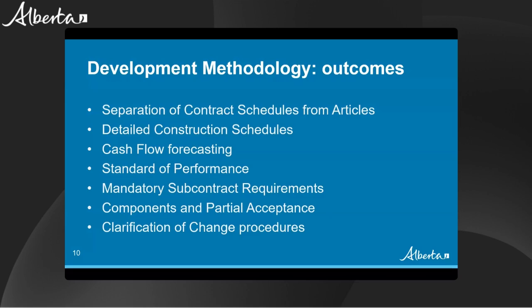We added written clarification about the standard of performance required for contractors and consultants, which is essentially the care, skill, knowledge, and diligence that would normally be provided by an experienced, capable, and prudent contractor or consultant performing similar work for similar projects in the province of Alberta. Adherence to contract documents is still strictly required. However, there's no general expectation of perfect performance or top of industry standards.